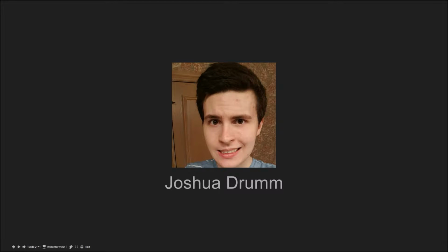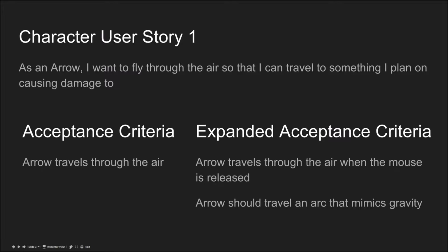This is me, Joshua Drum, and I am in charge of character and related user stories. My first character user story is, as an arrow, I want to fly through the air so that I can travel to something I plan on causing damage to. The acceptance criteria are that the arrow travels through the air. The expanded acceptance criteria are arrow travels through the air when the mouse is released, and the arrow should travel in an arc that mimics gravity.